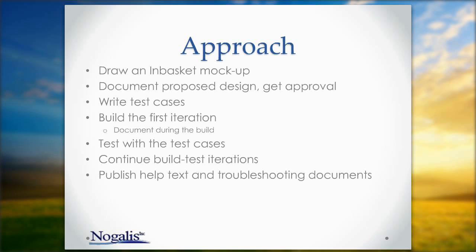Write a design document. Have the design approved by the stakeholders. Write test cases. Build a first iteration. And this can be a walkthrough of approvals for one item, but more typically the entire flow is built and tested in the first iteration.